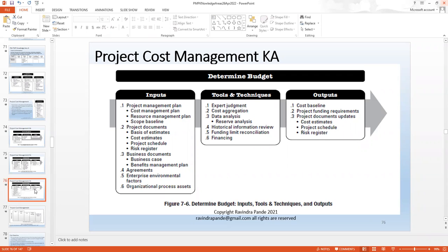The resource cost starts whenever a resource onboards, in the sense joins your project. It can be something like laptop, desktop. They have their overall cost with depreciation on all those things, but still the costs get attached to a project whenever you procure a new server, new desktops, new laptops, and so forth. And similarly, with the resources, if you are requested for mid level resources, their cost will definitely be a bit less than the cost of senior resources. And this way, I try to minimize the cost burden on my project.